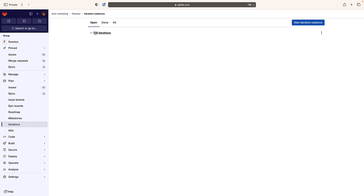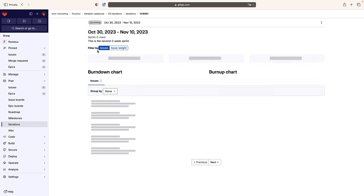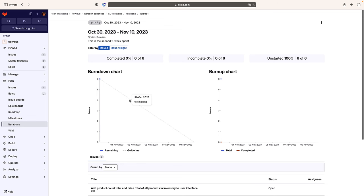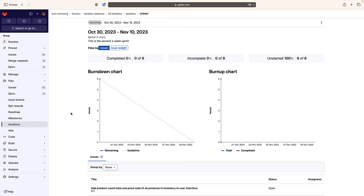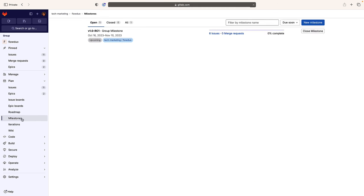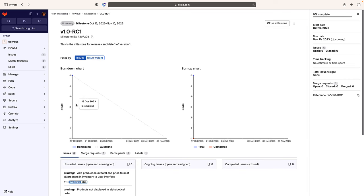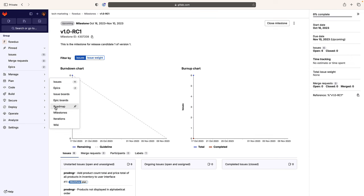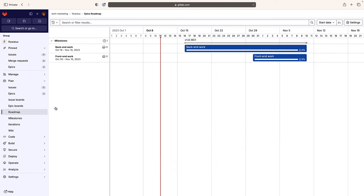Burndown charts help track overall progress towards a project's total scope, while burn-up charts track daily total count and weights of issues added to and completed in a given time box. She also checks the burn-up and burn-down charts for the milestone. Epics, milestones, and iterations can be visualized via the roadmaps page, which helps track release progress and streamline the release process.